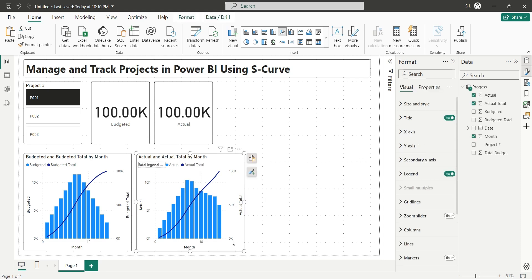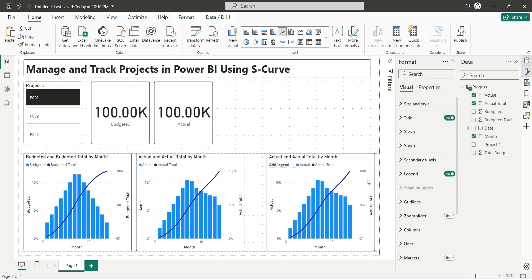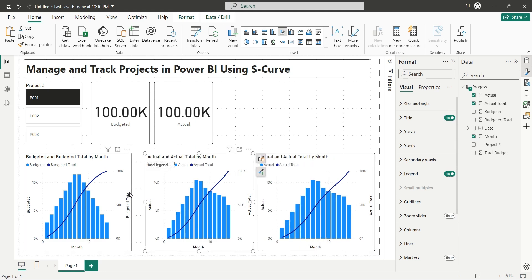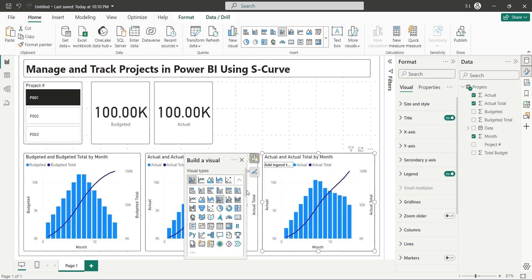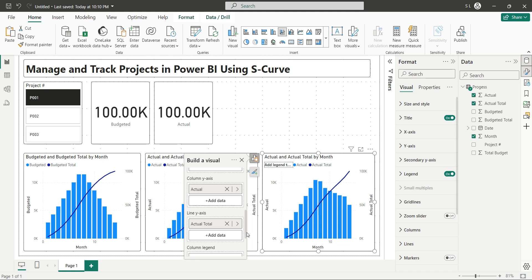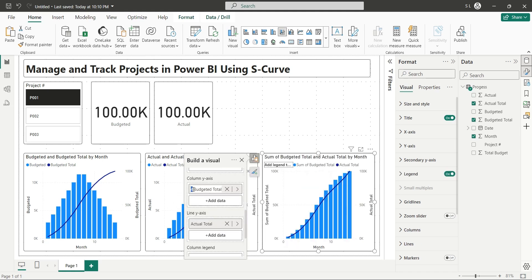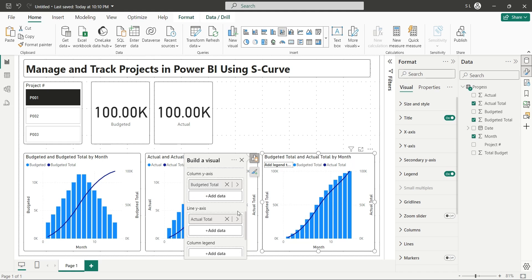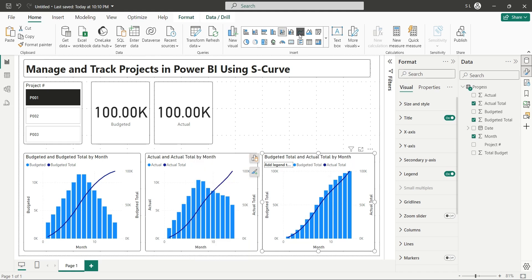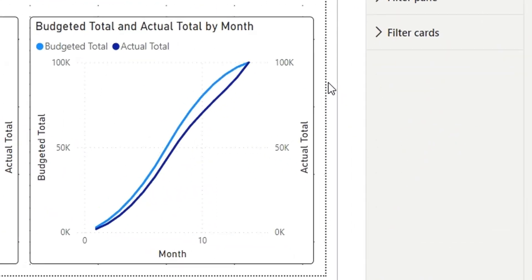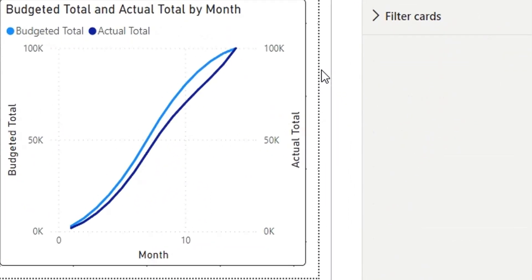Create a copy of the line and column chart and place it at the bottom right corner. Replace the actual field with the budgeted total field — we want to compare both cumulative fields. It is better to change it into a line chart. Now you can observe that the actual line has been below the budgeted line during the entire project timeline. However, at the end both lines managed to meet, as actual progress caught up to the planned progress.